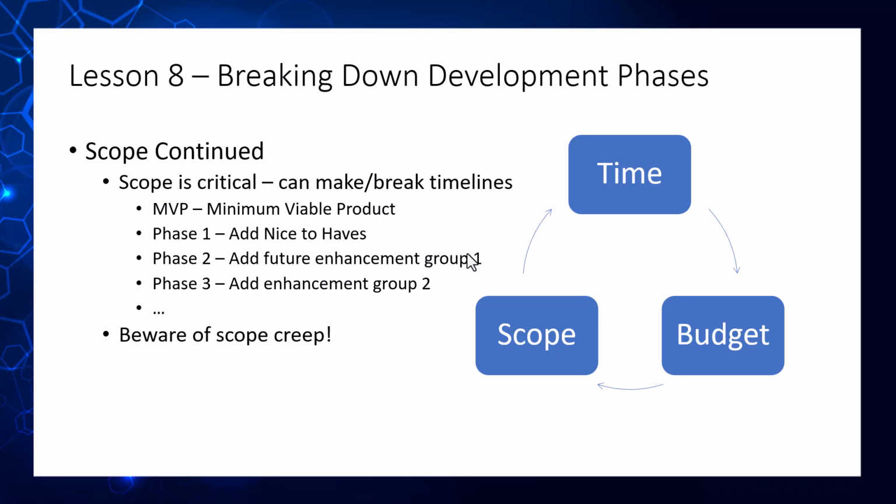So just keep in mind that the best way for you to maintain the same team throughout the entire course of the project and all the phases is to make sure that there's little or no gaps of time in between when you finish one phase and you move on to the next one. Organizations and freelancers are just going to jump to get the next project that they have, and then there's going to be no guarantee that they can come back and help you with that.